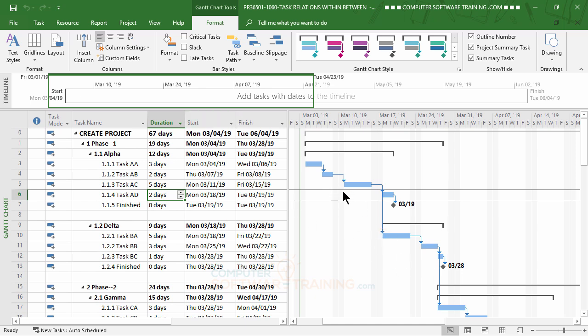We can color code the critical and the non-critical as 2 different colors, then you can see that more clearly. And then see whether or not maybe you made a mistake and maybe this should be connected to something further down, right? So over here in the Format tab, you go to the critical tasks, click onto that, and it turns into red what we call the critical tasks, but those tasks that are not going to affect the rest of the project, which are what we call non-critical, those are blue.